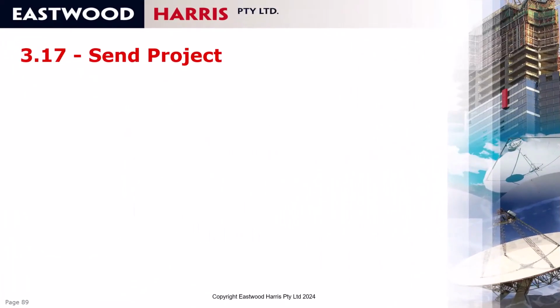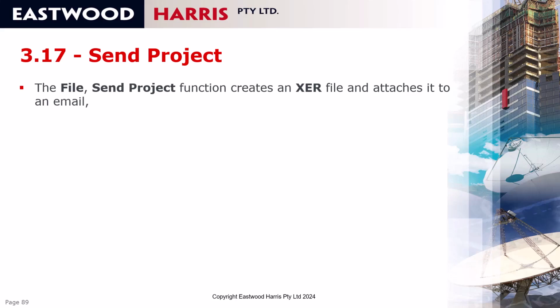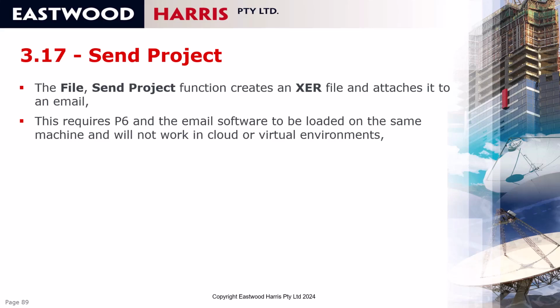So send project. In Oracle Primavera P6, there are several formats that you can export files in, and one is an XER file, which is a text file, and the send project command creates an XER file of the file that you have opened and attaches it to an email. This requires P6 and the email software to be loaded on the same machine and will not work in cloud environments and that sort of thing.